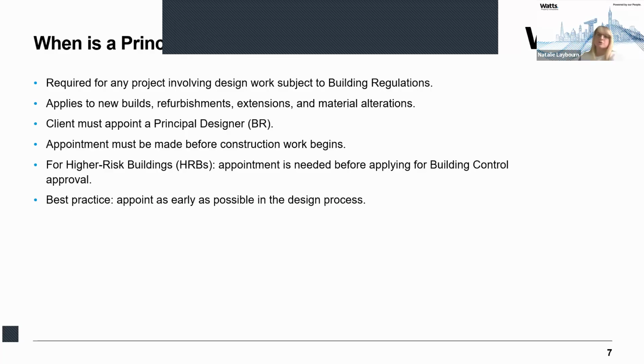While the law requires appointment before construction starts, it is best practice to involve a designer as early as possible, ideally during the design stage. This ensures that safety, compliance, and coordination are embedded from the outset. So that would always be my advice, as early as possible. For higher risk buildings, the principal designer is slightly different. They must be appointed even earlier, before submitting the building control application to the Building Safety Regulator.